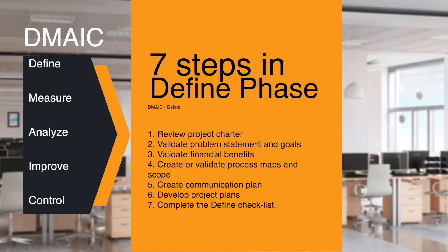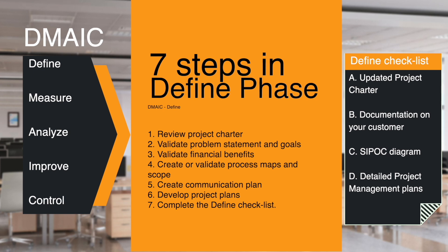There are four items on the checklist. Item A: An updated project charter consisting of a problem statement detailing when the problem occurred, what the problem is, the magnitude of the problem, and the impact of the problem. Focus only on symptoms, not solutions and causes.